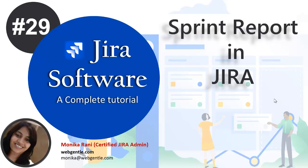The Sprint Report is useful because it gives you a quick snapshot of how the sprint is progressing. It includes a condensed burndown chart and a summary table that lists all of the issues in the sprint and their status. That's why it's very important. This Sprint Report is useful for the retrospective meeting and for mid-sprint progress checks too, because it allows you to check the progress in the middle of the sprint. You can see how many issues are completed, how many are not completed, and if you've added any issues after starting the sprint, you can see them in the Sprint Report as well. That's why it's super beneficial.